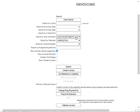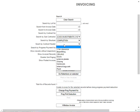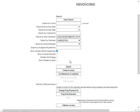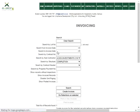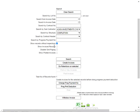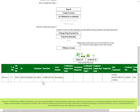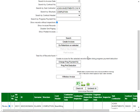So I've selected the subcontractor, I've selected the structure. I can select the header but I'll leave it out because it's not too important. If you leave it out it shows all the ones that fall under completion. I'll say show records without inspections because at the moment this one hasn't been inspected yet. Normally you would only do this after it's been inspected by the engineer.